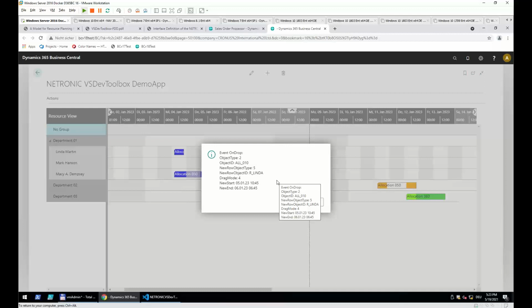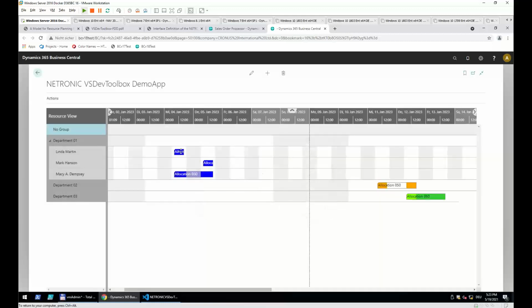So you don't need to update all of them again. All others stay in place where they are. But if, for example, you move one allocation here and you have a dependent allocation which is linked, then your application needs to calculate this. So you calculate the predecessors and successors as well, and then you need to update these as well.